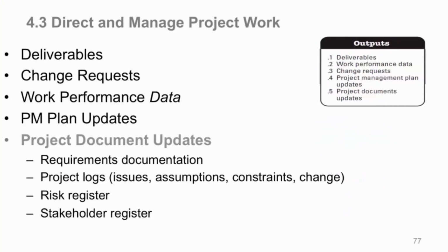And that risk register is a project document, one of the key project documents. And your stakeholder register is also a project document. And certainly, as you're building, talking to your stakeholders, you may have issue logs, which it already says up there. But for your stakeholder register, as we'll see later, what the stakeholder register does is you classify all your stakeholders relative to their power in the organization, the influence they have over your project, whether they're a resistor to your project.